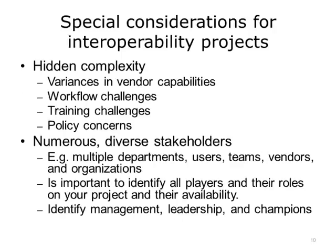Interoperability projects have special considerations. They often have hidden complexity, so be prepared to manage a growing scope. Complexities often include variance in vendor capabilities, workflow challenges, training needs, and policy issues such as regulations affecting data sharing. Such projects involve numerous and diverse stakeholders. Stakeholders can include multiple departments, users, teams, vendors, and organizations. The team working on interoperability projects often does not follow typical departmental boundaries.